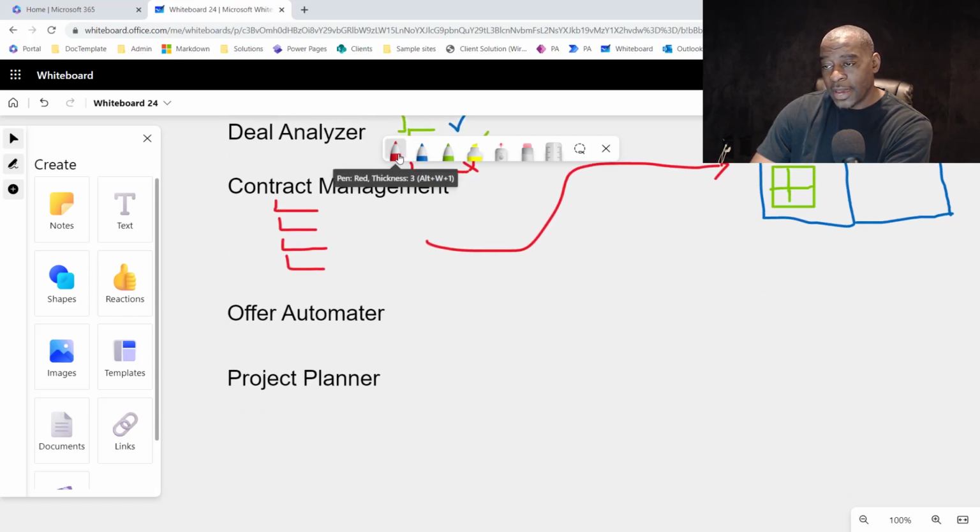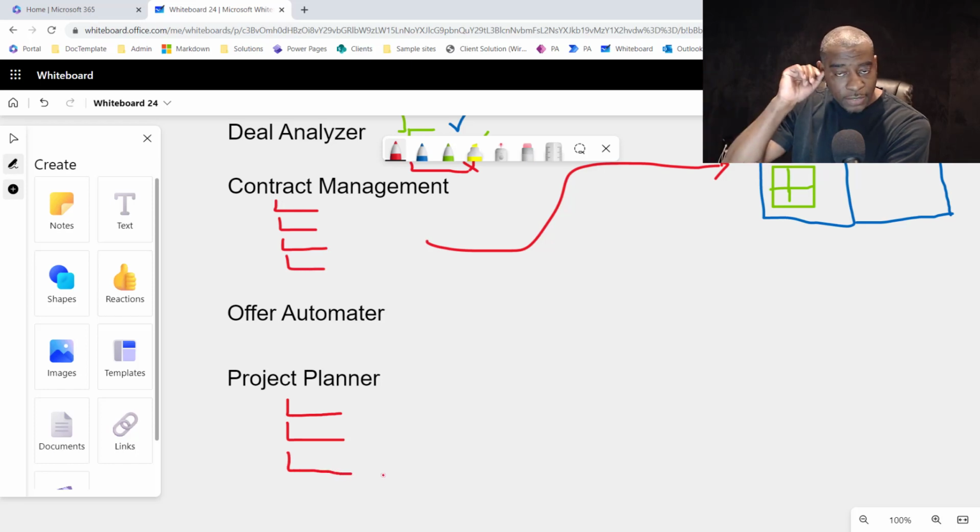With that rehab, you're going to have several things. One, you want to plan the level of the rehab. There's a construction budget that you have to stay within. And then you have an order of execution for the subcontractors, the different contractors who are going to help with the rehab. Who do you call first? Once that's done, who do you call next? Which of these can you do in parallel?